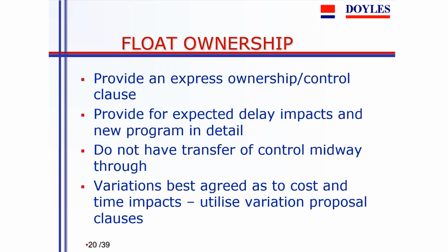This is an interesting concept, usually applying to complex projects. But the issue is that if the contractor can finish early, so the project program is 12 months and the contractor is pretty confident he can finish it in 10 months, then there's 2 months float, there's 2 months gap. And the question is, well, who gets the benefit of that? Is it the contractor getting the benefit so he can manage his resources so that he can creep out from 10 months to 12 months?